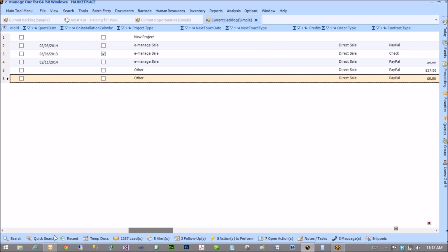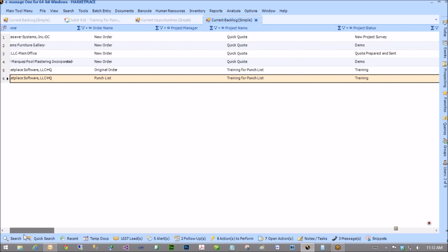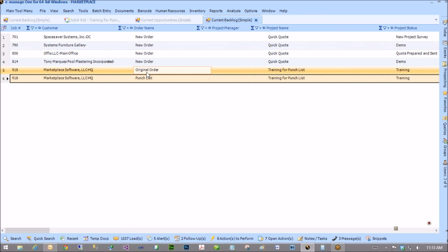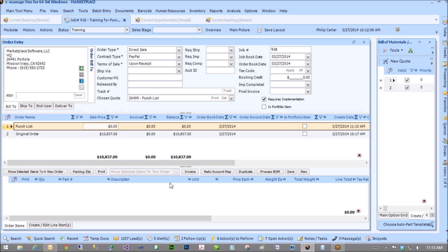The 0 sale pricing stays on until you do the order complete. And again, this original order will stay there until I invoice it fully. So don't think that order complete is going to remove anything that has a sale price that's not 100% invoiced. It won't do that.